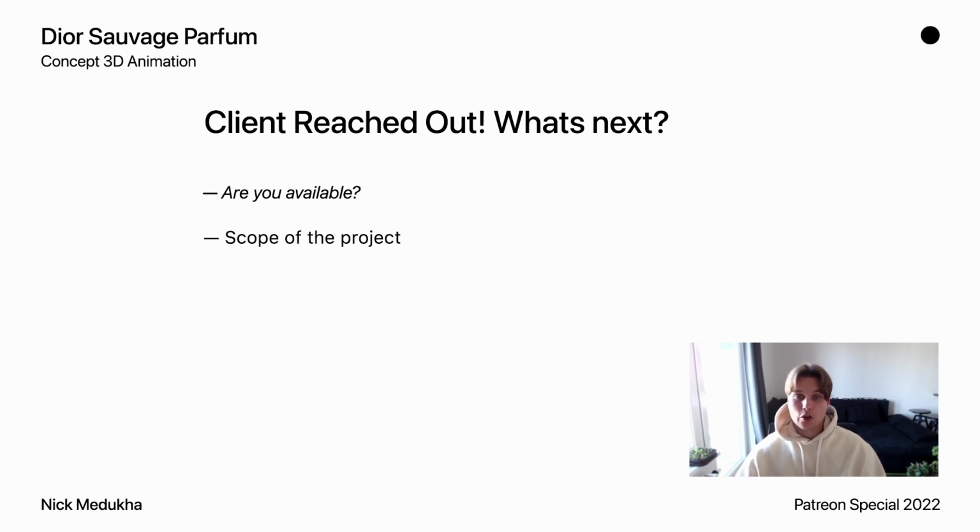First, what is the project scope? So the scope, here the goal, is to understand what parts of the creative process we will be working on. In our case, it's a full production cycle from initial idea to the final 3D animation. On this question, the answer might also be something like, we need you only for the research and development phase, or we need certain assets to be modeled and that's it.